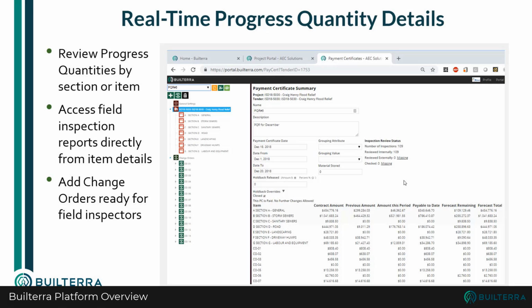Forecasting was something we put in so the project managers or CAs could anticipate overages and then run a separate pricing list on the items. Then they can say, hey, we're going to be over on this item, maybe we should do a change order. So there are lots of ways to track the data and export it.